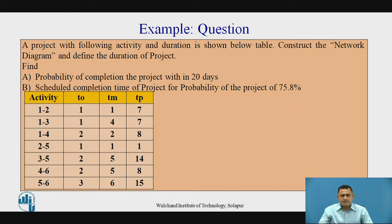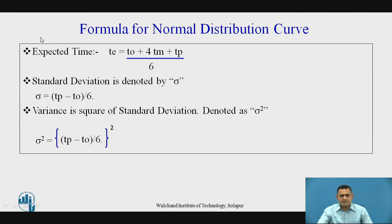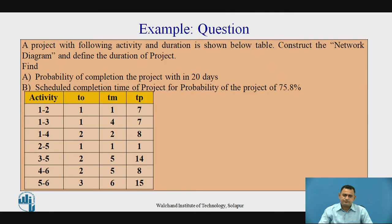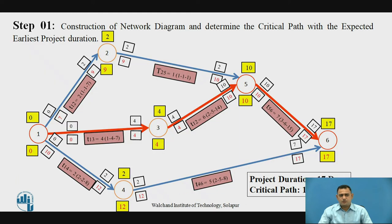Now let's start stepwise. These are the activities and their optimistic times. We have to determine the expected time for each activity using the formula Te = (To + 4Tm + Tp) / 6. With this formula we define the expected time of each activity, then construct the network diagram using the AOA method, the activity-on-arrow network technique.